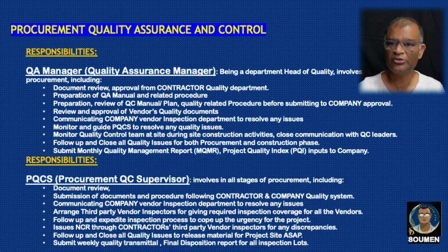Then PQCS is one of the busiest guys in procurement. He is involved in all stages of procurement. Basically, all the tiresome job is being done by the PQCS. Document review, submission of document, and follow up till it is approved, communicating with the company vendor inspection department, arranging third-party vendor inspectors for giving required inspection coverage for all the vendor activities, manufacturing or fabrication work,